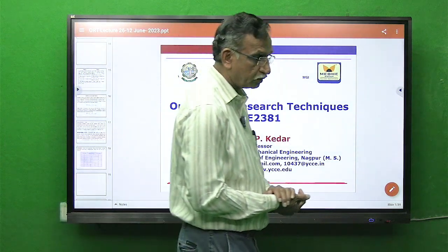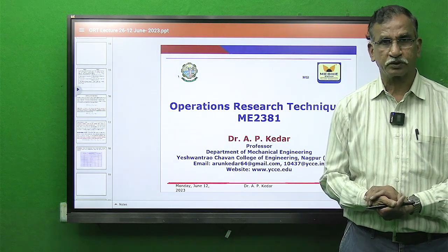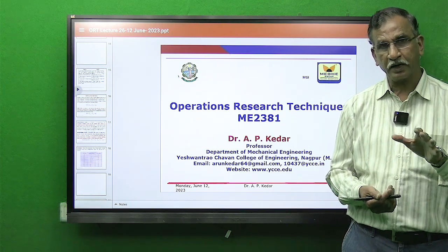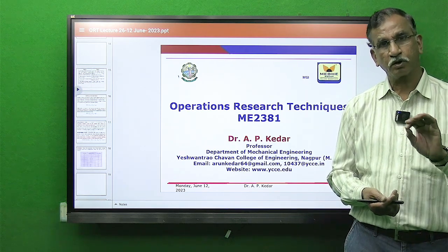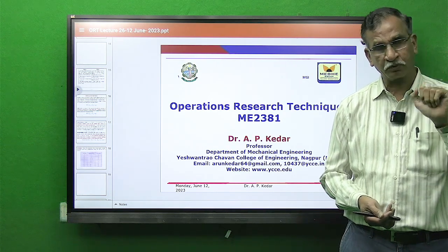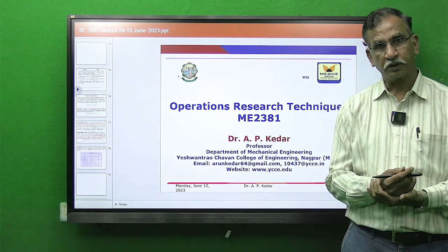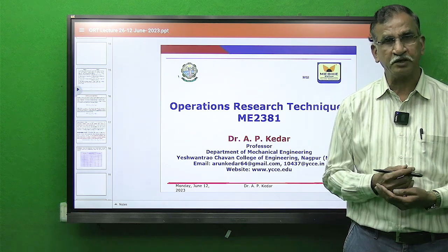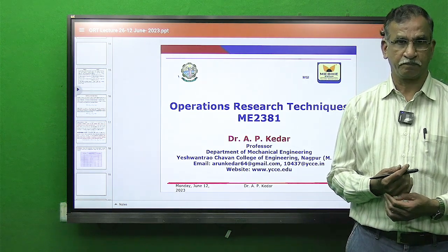Students, in real life scenarios, all projects where you are not sure regarding the time requirement are analyzed by the concept of PERT, where there is a lot of uncertainty. But when we are deterministic in nature, that is, we know this particular activity will require this much time only, in that case we use another tool under project management, and that is critical path method, CPM.